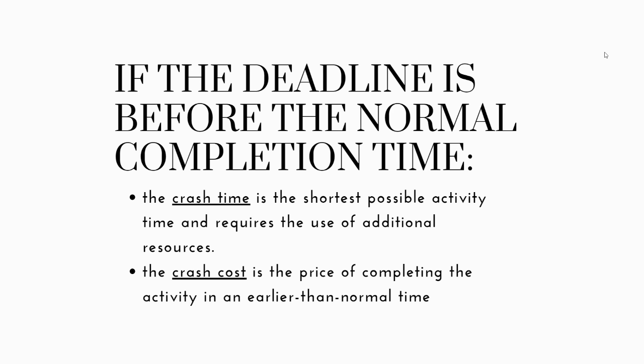If the deadline is before the normal completion time, then we can say that the crash time is the shortest possible activity time and requires the use of additional resources. The crash cost is the price of completing the activity in an earlier than normal time.